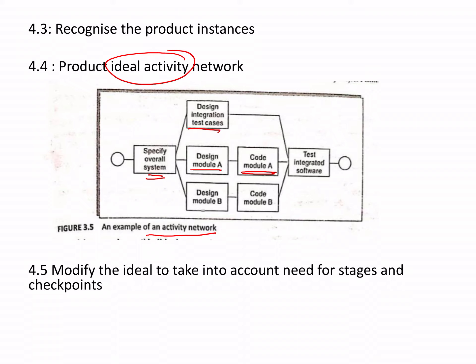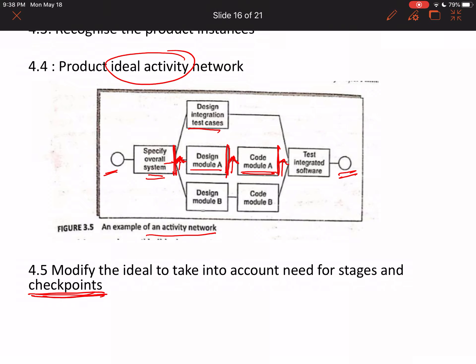You decide the ideal activity sequence and then, depending on your specific needs, break it down into smaller parts or redefine it slightly to create checkpoints. Without checkpoints, a project can drift from start to end without realizing it has diverted from the expected result. Identify where checkpoints will be placed — for example, check whether the design of module A is complete before starting to code module A — to ensure you are always moving toward the expected output.